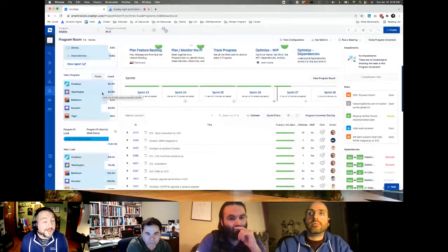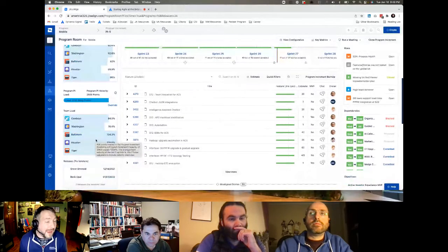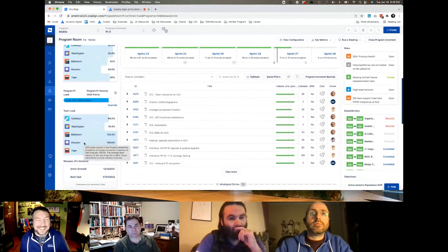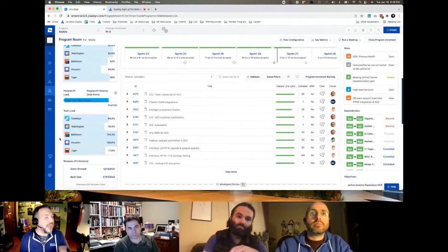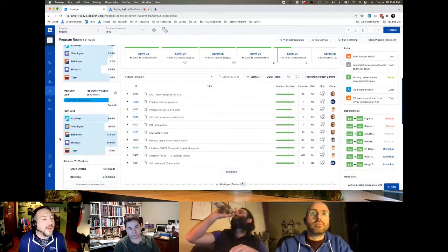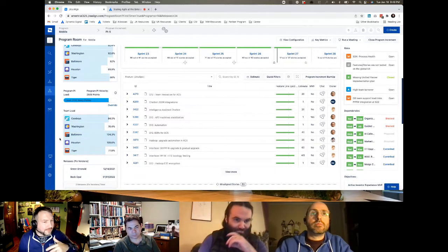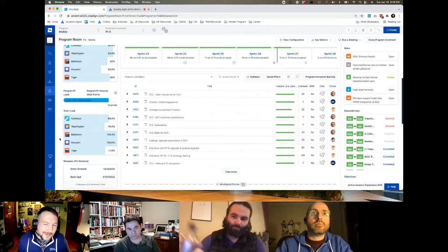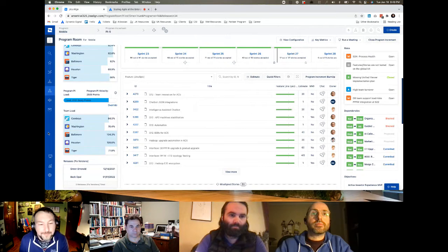Along with that, we can understand how teams have loaded themselves up based on past capacity. In this case, I might be looking at Houston as a team and saying, it looks like you're about 10% over what you normally can do. I might ask, what's changed in your environment that has led you to think you can take on more work? And they may say, no, we overplanned this PI. And as an RTE, I might say, let's look to scale some stuff back, because if nothing's changed, you might be setting yourselves up for failure at some level. So here it gives me the ability to see this all in one picture.